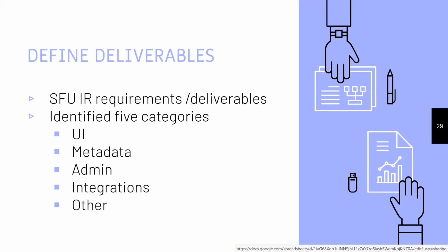But based on some project overruns in terms of schedule, for example timelines, we, in collaboration with the service provider, decided to change the requirements in this area because we just didn't really have enough resources and time to do what we had set out to do. This was a risk that we hadn't identified, so we didn't have a plan, but we managed to recover from it fairly easily. But we got lucky in that case.